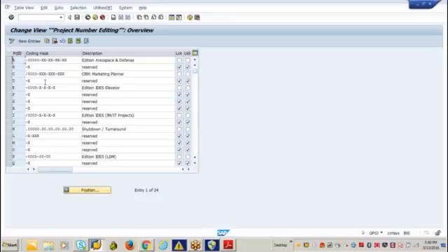Suppose you are having 200, 300, 400 or even 900 projects in a particular year. In that case, you can define CAP hyphen 000, meaning up to 999 projects can be created. Suppose your company has only a few projects to take up in a year. Why should I have 3 digits there? I can simply confine to 2 digits, so CAP hyphen 00. Then up to 99 projects can be created in a particular year. Clear?